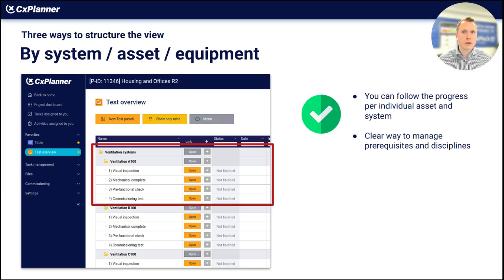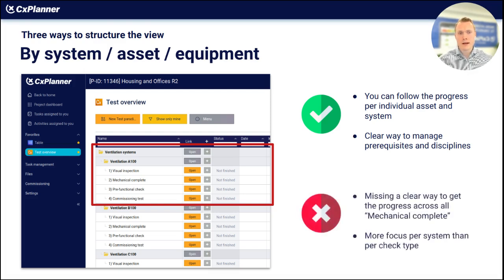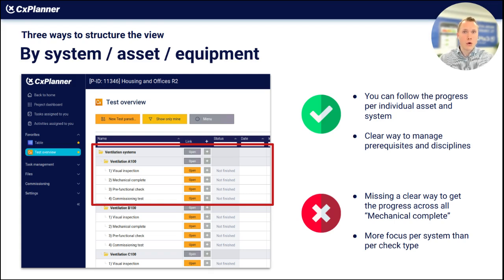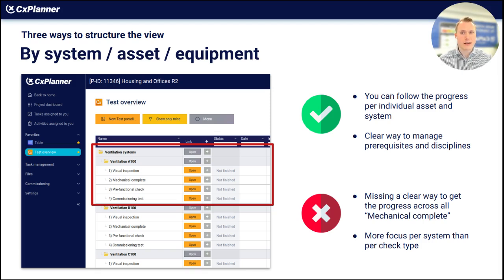This structure often gives good benefits when you don't have thousands of ventilation assets. The cons include missing a clear progress overview of mechanical completion across the whole project, since mechanical complete is now embedded within each specific system. You'd need to look into each system to see how far mechanical complete is, rather than getting one specific overview across the project. This structure has more focus on the system level than on the mechanical or pre-functional check level — something you have to decide based on your project.